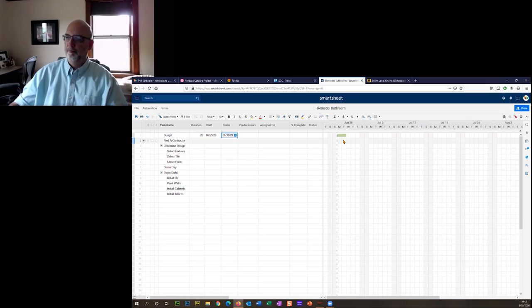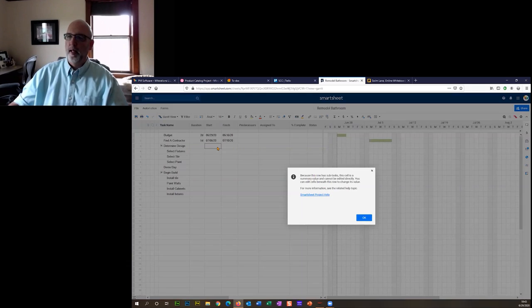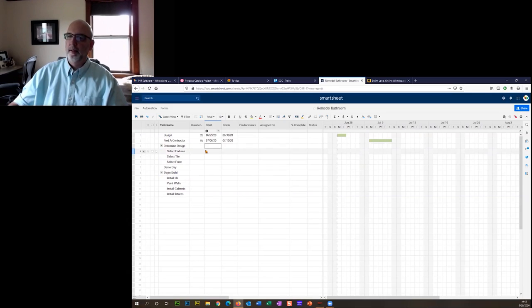So this is a view of what this might look like. So I figured out my budget on, let's see, July 6th. I'm going to take the rest of the week off for the 4th of July. Going to start back up on the 6th, find a contractor. That's going to probably take me a week. Going to determine the design. Now I'm trying to click here and no date pops up. Nothing's happening. Why? If I double click, it's because this has subtasks. So the subtasks drive what this date will be.